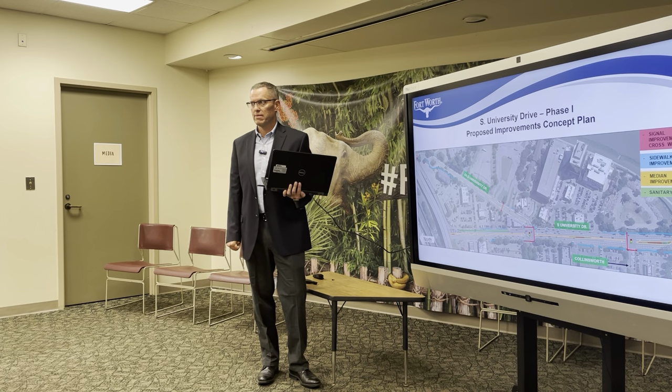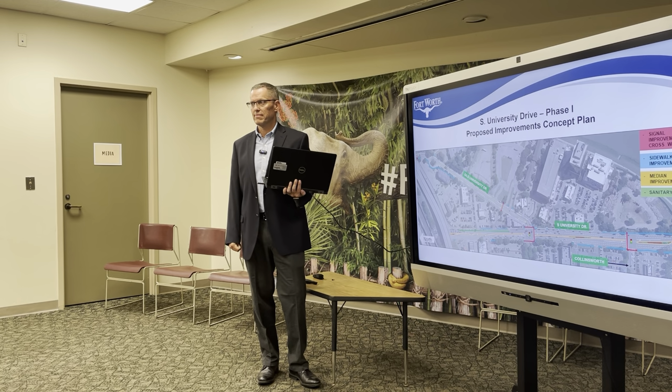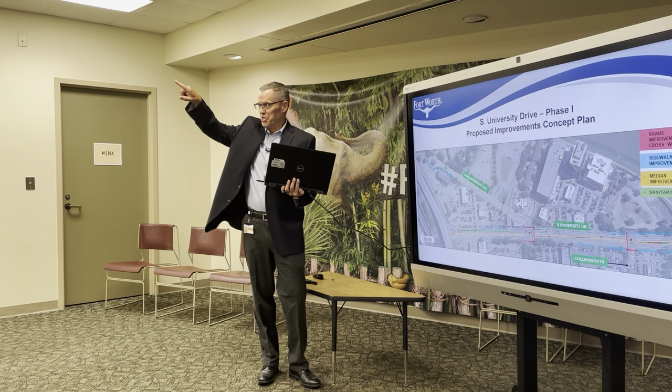And I have one kind of follow-up question. Yes, sir. As with everything that's happened since the 2018 bond package, prices have just gone through the roof. How is that accounted for in this project now, paying for it in 2023 and 2024? Construction costs did increase. Construction cost was estimated at the time to be about 2.4, 2.5 million, and it's now about a million more. It's not a whole million because the water department added scope that wasn't included at the time, so it's about $700,000 more, but it's funded. Still from that same bond? From the same bond, yeah. Residuals from that bond. We're about to wrap up that bond program, so whatever wasn't used, some of it went to this project. One second, I've got a question in the back corner there.